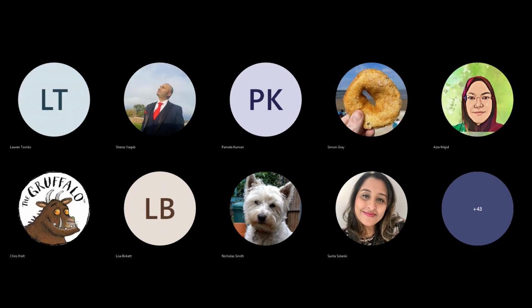Very, very important. I always encourage working in the open, being transparent. When you're kicking off a product or service, make sure you're identifying all of your key stakeholders and key users. There's something called an agile onion, I don't know whether you've heard of it, that helps identify who you need to be engaging with regularly and who just needs to be kept up to date. Doing things like show and tells helps, but we know that people can't always attend, so make sure you're taking the time to build those relationships with your stakeholders and work in the open, show them what you're doing, and validate what you're doing.